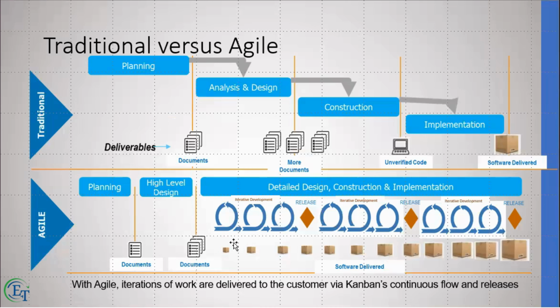And through each of these 2 to 4 week sprint cycles or iterative cycles, you would get something released at the end of these iterative cycles. Which may not have the full functionality, but it will have some functionality, maybe a login page, which is not really doing any authentication, but it will show you the look and feel of a login page, or it will show you a prototype of what this end product would look like.